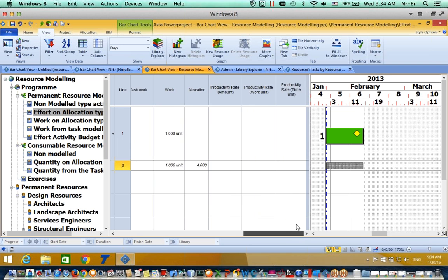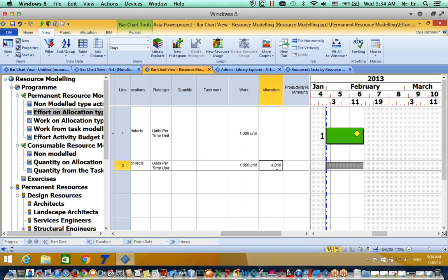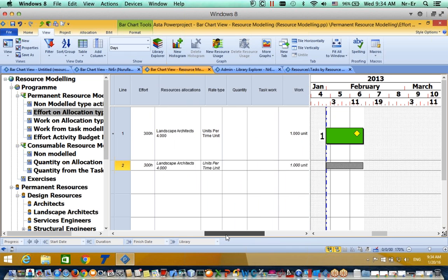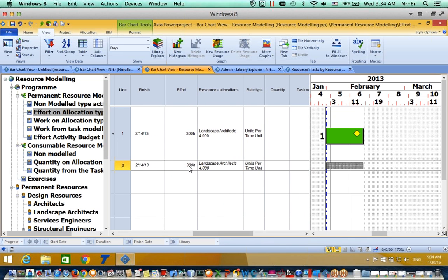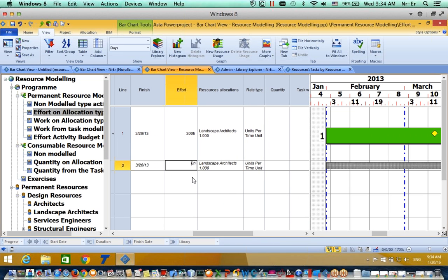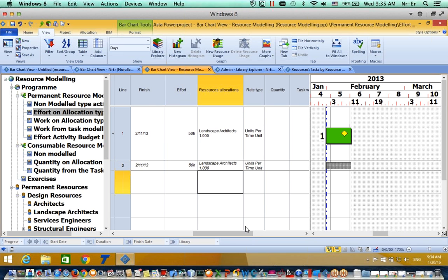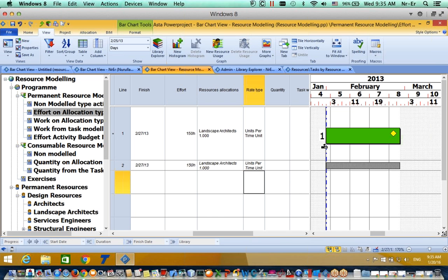Or I can say I have just one architect and just 50 hours of work, and the system also calculates the duration for me. Let's say 150 hours, and it is going to be, let's say, 18 days and 6 hours.